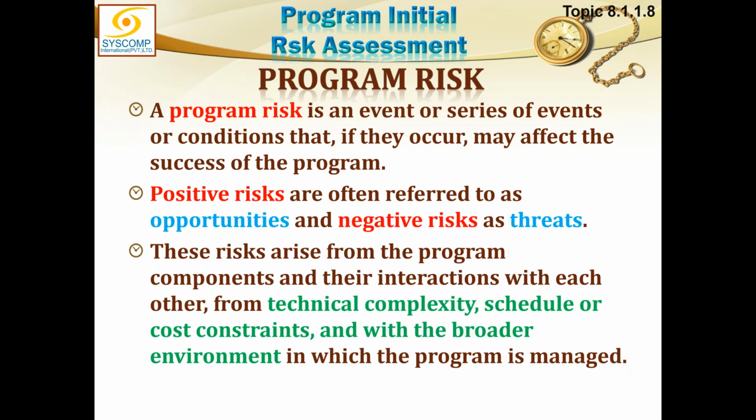Then they become the program business, right? Anything which is not affecting this remains a project risk, and the project manager does not need to share that with the program manager. The program manager will assess the project risk and see if there is a risk which can be escalated to the program level due to the reasons we have just described.